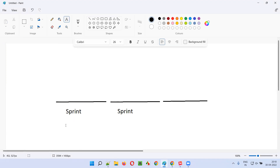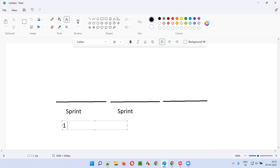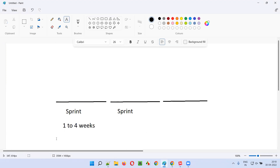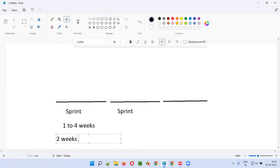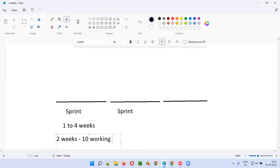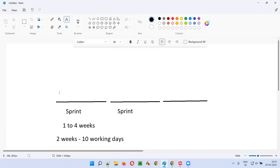This sprint will have a duration. Depending on project to project, the duration can be around one to four weeks. Ideally, most of the projects will have two weeks as their ideal sprint duration — that is nothing but 10 working days, excluding Saturday and Sunday. So the work assigned to this sprint needs to be completed in 10 working days if it is a two-week sprint.